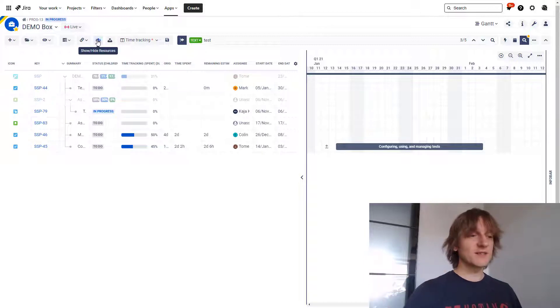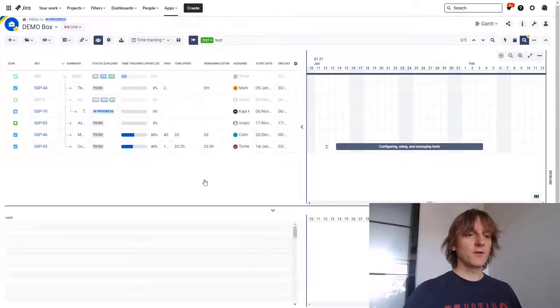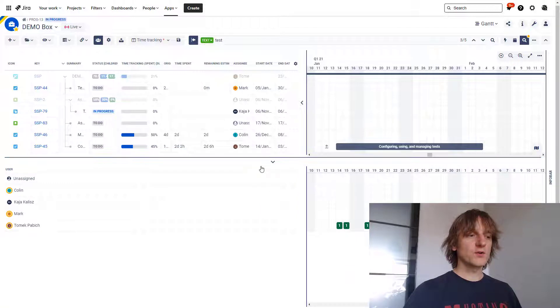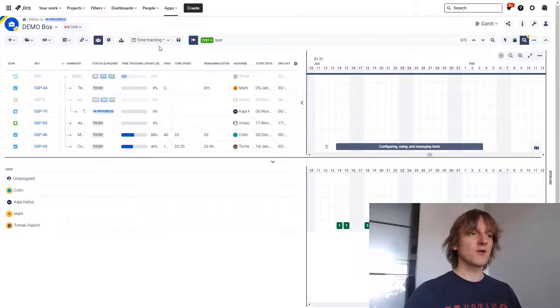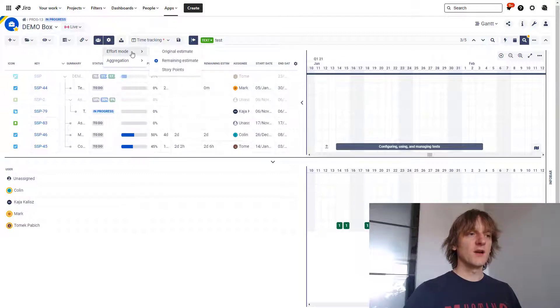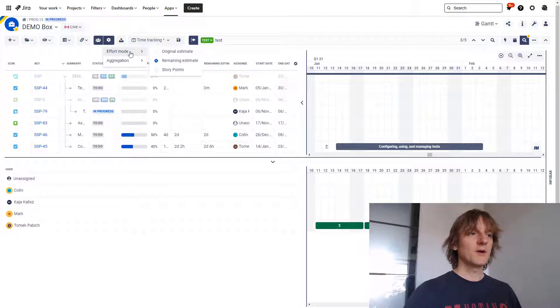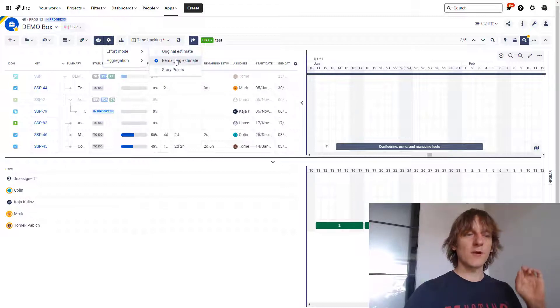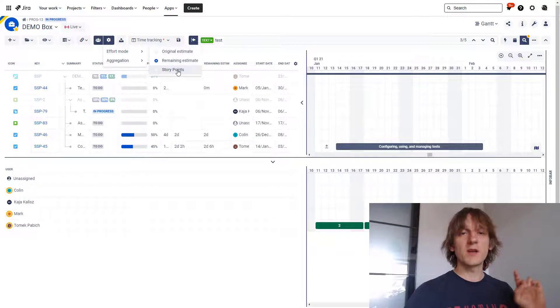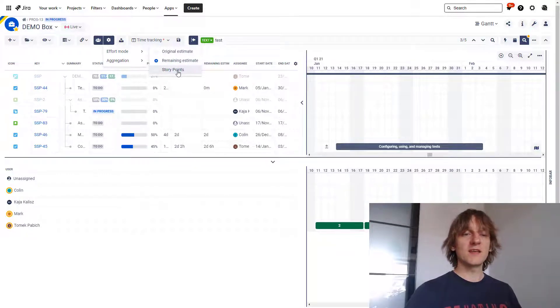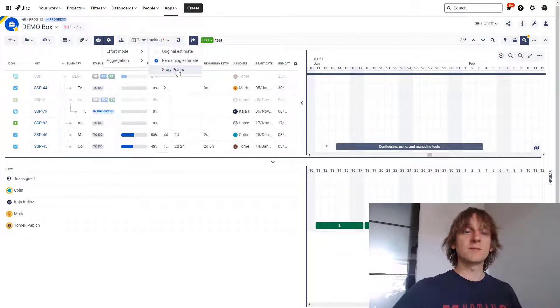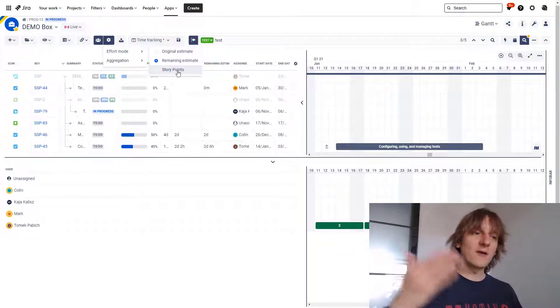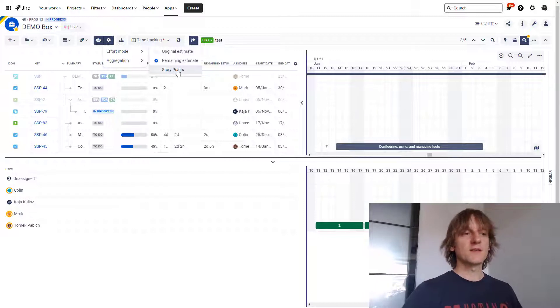Another thing that is available on the Gantt is in the show/hide resources panel. So if you open this panel, it shows you your resources with tasks assigned to them, and you can see the resource information over here in terms of the resource allocation. Of course, you can change the aggregation, for example, to weekly, but you can also change the effort mode. And what has been added over here is the story point. So previously it's been missing here. It's been only available in the resources module. Now it's also visible over here.